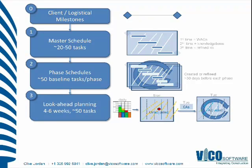This is where most of the changes occur through look-ahead planning with location-based management. We have a clear and simple way of updating progress: in the control chart, we simply tick boxes to show which areas of which tasks have been completed. This is reviewed on a daily basis — it's easy to do daily because it's just ticking when things started and finished in each location.